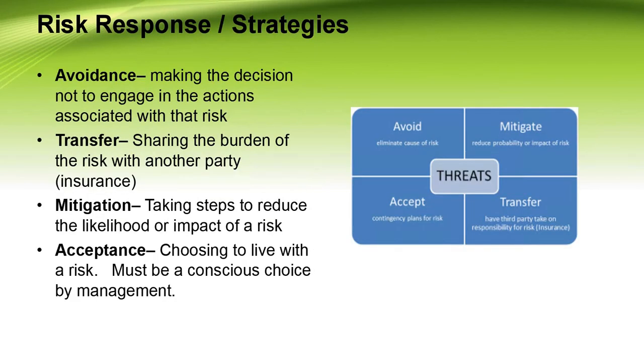So, risk response strategies. Risk management involves creating a risk register, a document that details all known risks and their related mitigation strategy. Creating the risk register involves mapping the enterprise's services and data sets, as well as identifying vulnerabilities in both implementations and procedures for each.